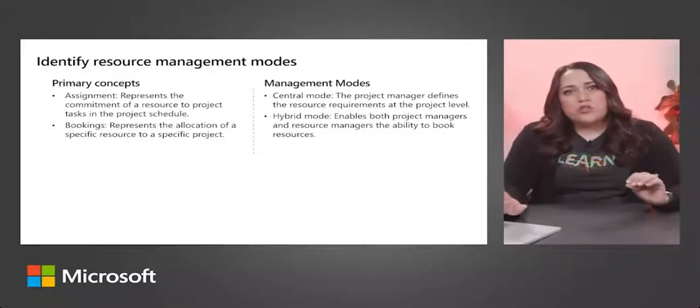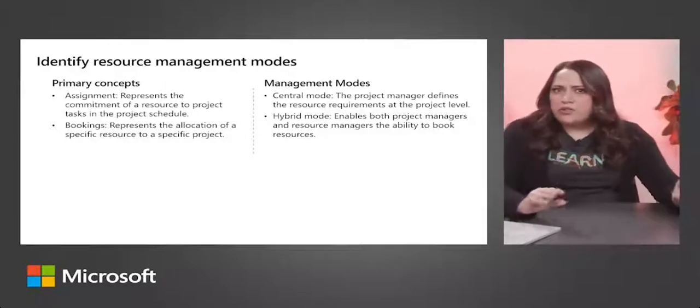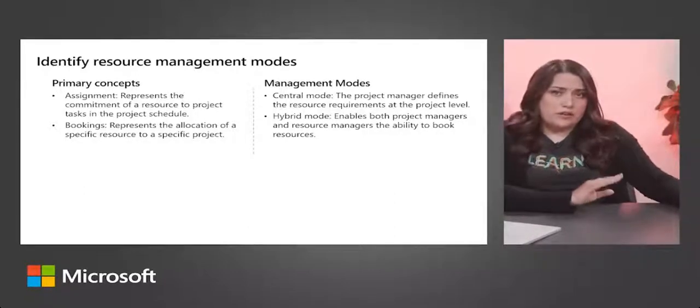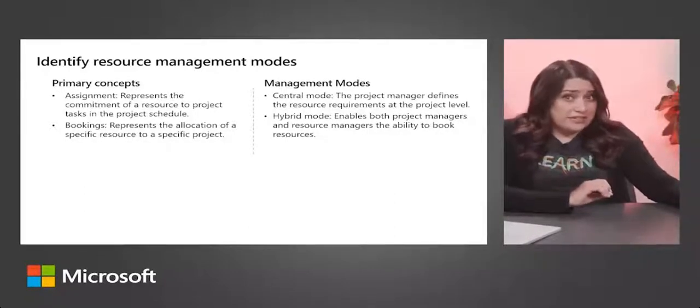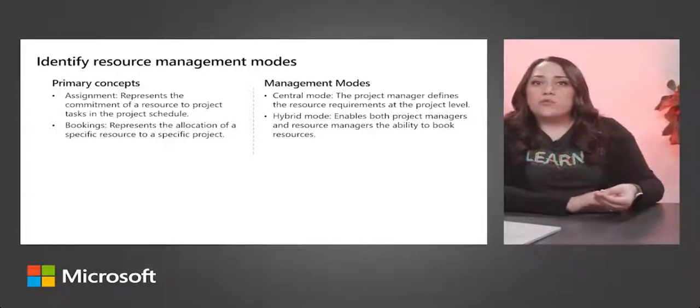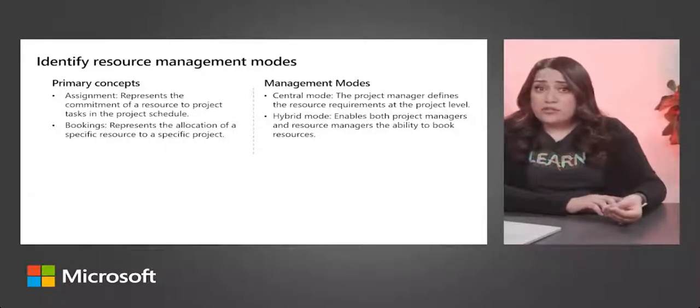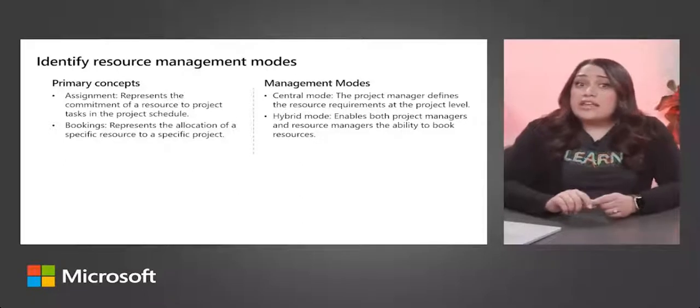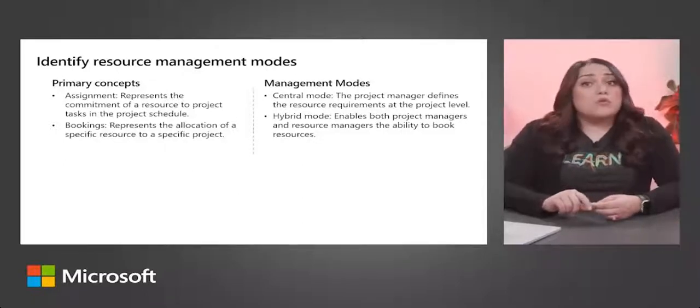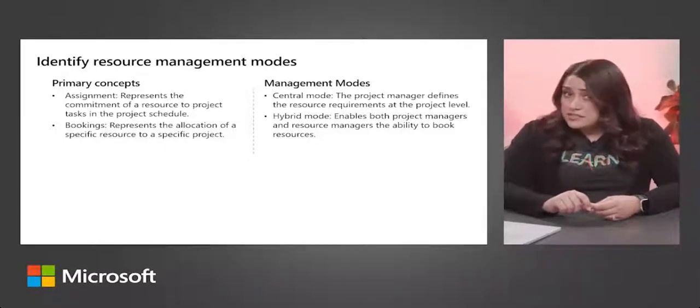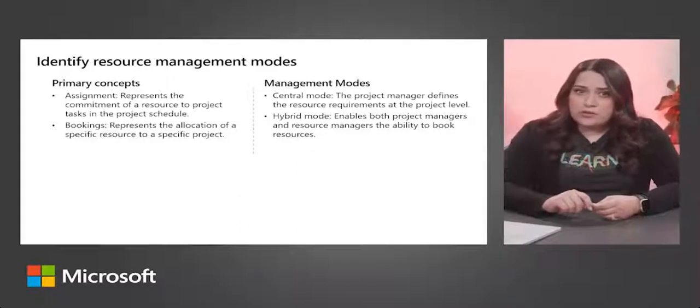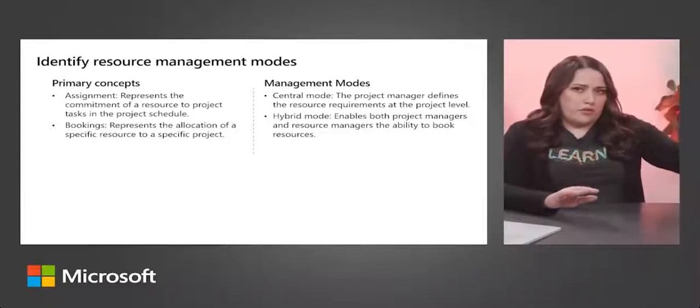Now, the way that resources are scheduled is very similar to what we looked at in Field Service, but there are some key differences. When we schedule a resource inside of Project Operations, you have two options. You can either schedule an assignment or a booking. An assignment is a commitment of a resource, but it may be out there in the future.